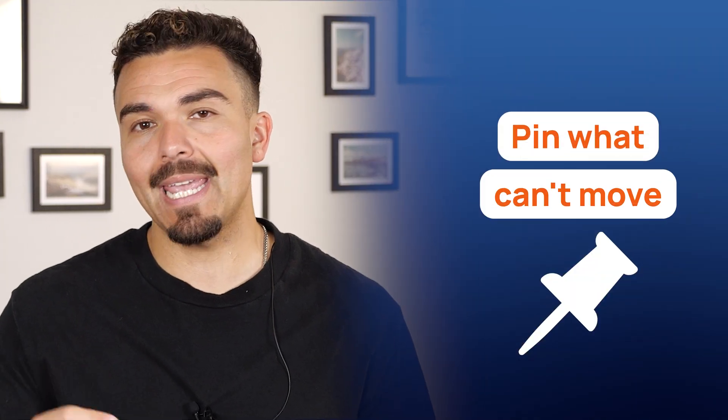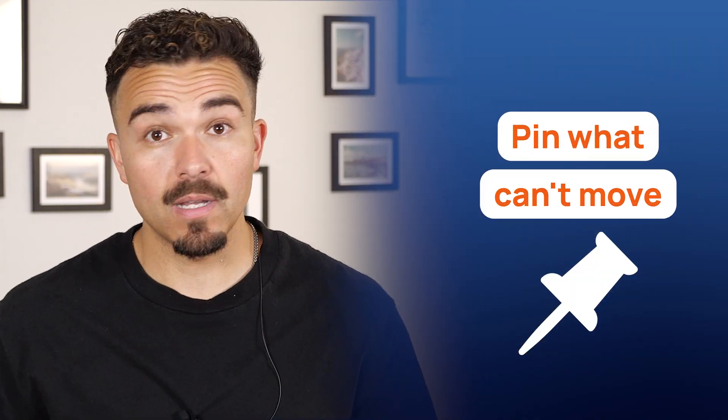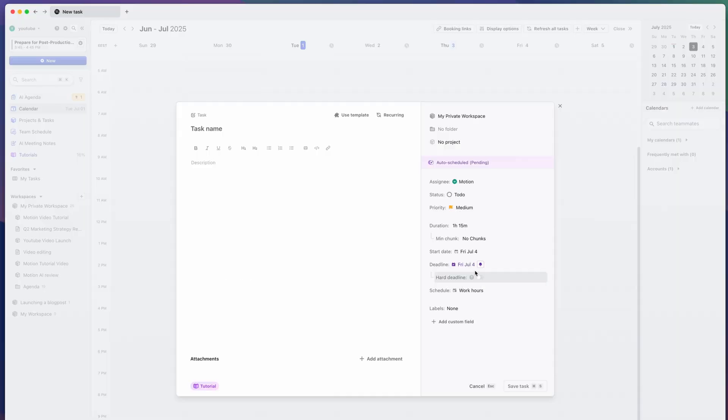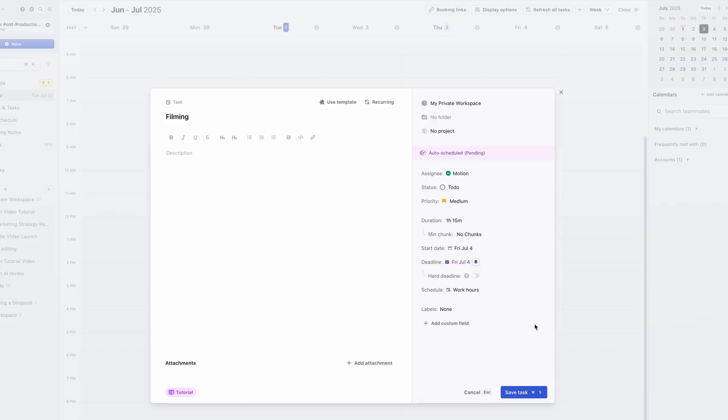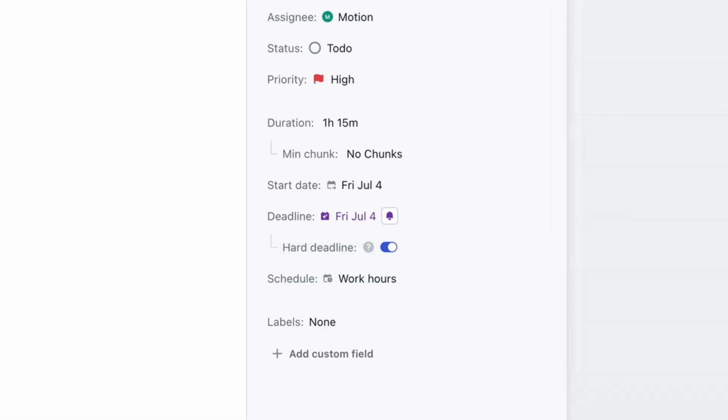Second, pin what can't move. Got a shoot at 2pm on Friday? Pin it, and Motion will build the rest of your week around it.